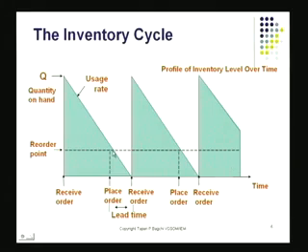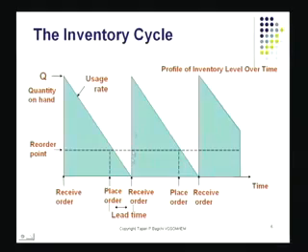What we do is, generally speaking, most goods take some time to produce. If you place an order today, it will take some time for the supplier to make sure he's done the production and he supplies the stuff to you. It takes some time. This is called the lead time. In fact, it's very important for us to realize that there is almost nothing that has got instantaneous supply. There is always some lead time involved. If that is so, then I should not probably wait when my inventory runs down to the zero level and then place an order. Because where is the lead time? I've not given the supplier any kind of lead time. How is he going to be instantaneous to supply the goods to me?